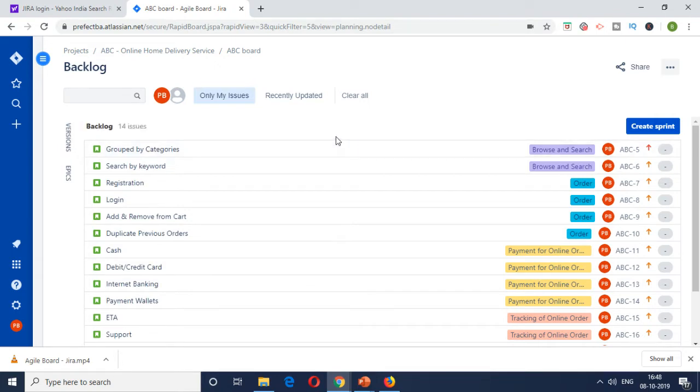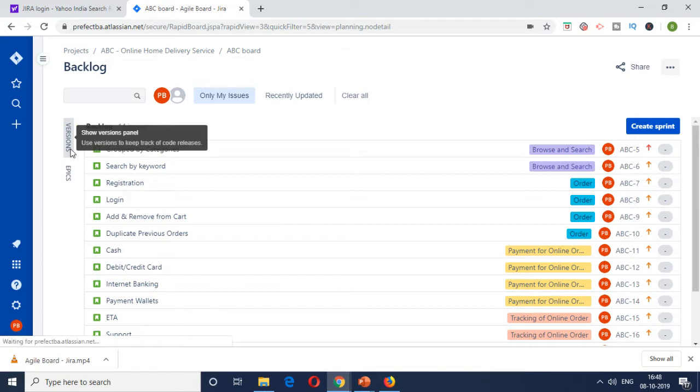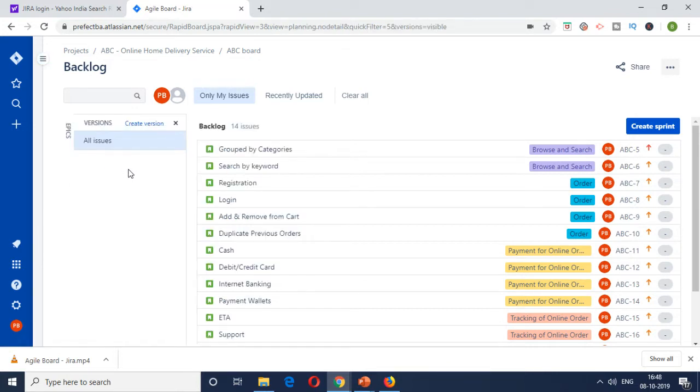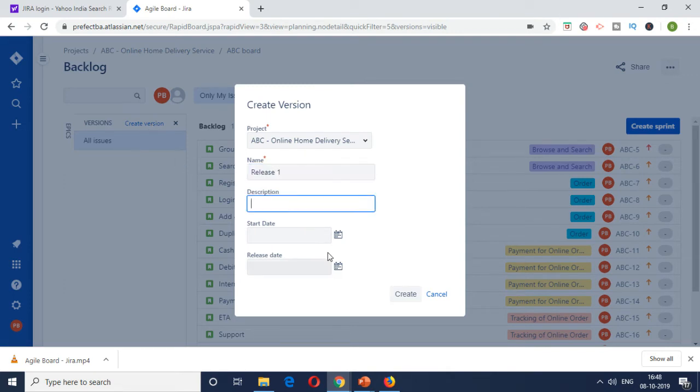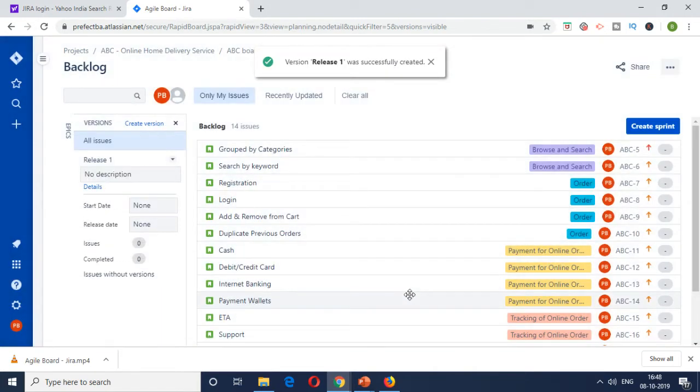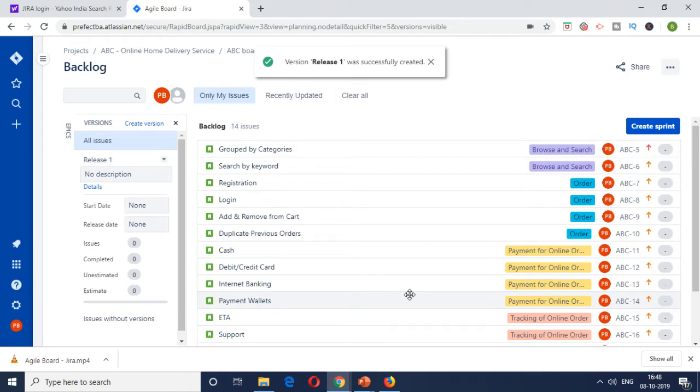So in order to create a release, you have to click on the versions tab here and then create a version. You can name it release one. Description and start date are optional. You can tag it later. So you create this one as release one. So release one is created.